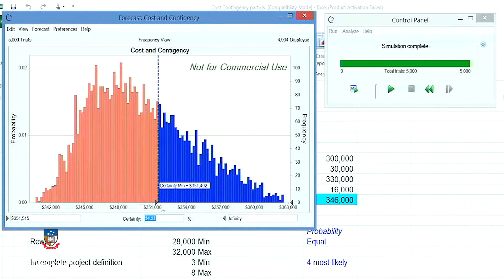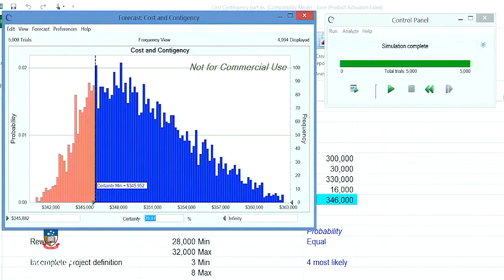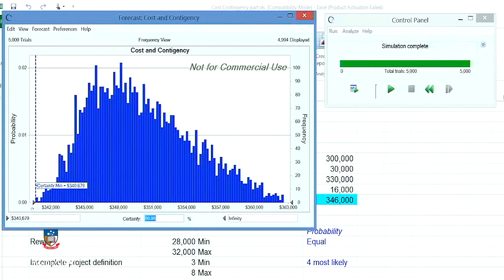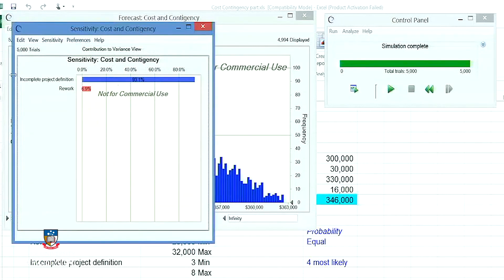For example, the 50% probability level, or P50, equals approximately $352,000. This means that there is a 50% chance that the cost will be above or below $352,000. I can then move up and down to determine, say, the P90 or P70. I can also find out, of the two variables, which one is more sensitive to change. This may be important for the project manager to understand, and clearly here it is the risk or contingency component that is highly sensitive.